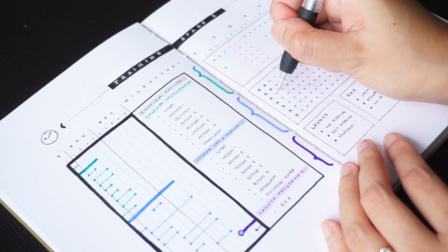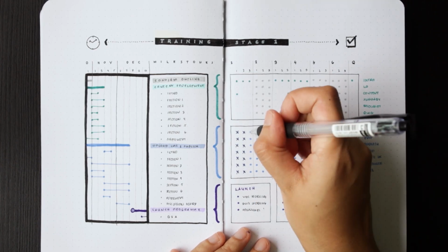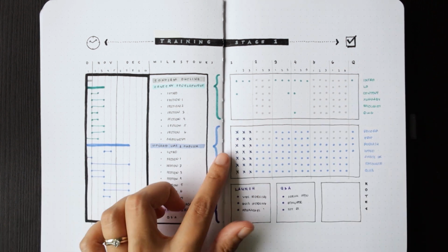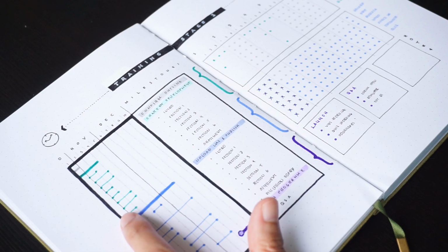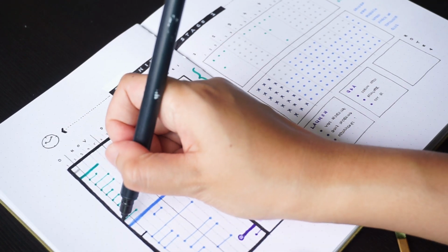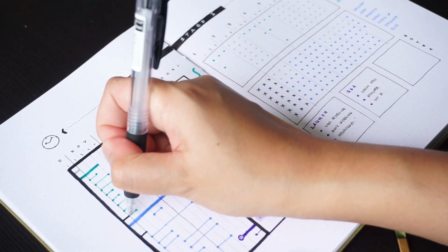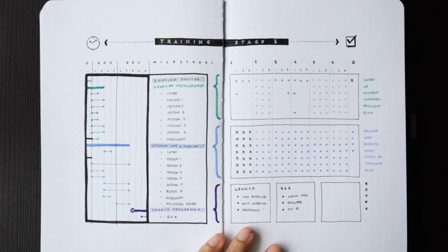Because this task list also functions as a completion checklist, I can also update my timeline as I complete each activity. Here you can see that I have finished all of the tasks for this activity. So now I'm drawing over a black line on this schedule with a cap at the end to indicate my actual completion date, which happened to be a week earlier than planned.